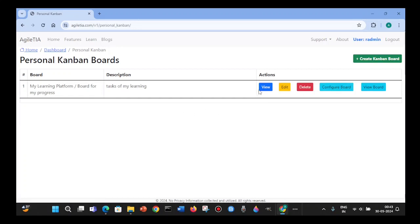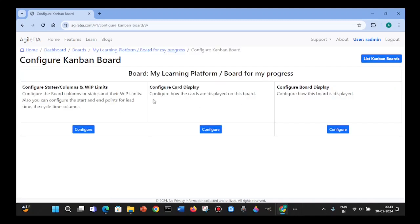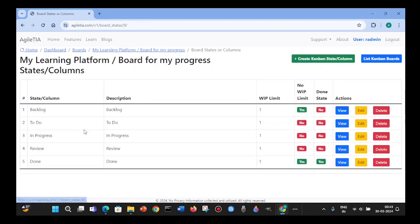You need to configure the board first. The board configuration contains columns and WIP limits, as well as card and board display options. For now, we will focus on the columns and WIP limits. By default, this software creates these columns: Backlog, To Do, In Progress, Review, and Done.